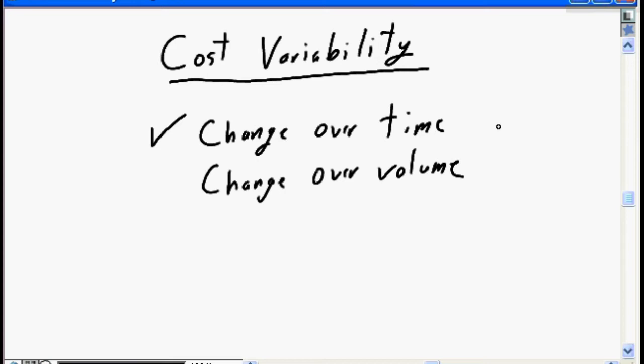If you need to buy material throughout the duration of your project in month 1, month 2, month 3, month 4, how much control do you have over the cost for that material that it's not going to change over time? That it costs $1 in month 1, it may cost $1.50 in month 2, it may cost $1.75 in month 3, it may go back to $1.50 in month 4, and so on. What control do you have over the cost, i.e. what control do you have over the effect inflation or deflation is going to have on your project costs?